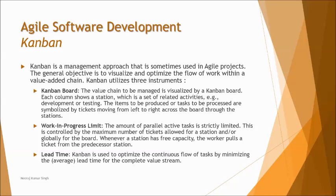Work in progress limit enforces strictness on parallel ongoing activities, setting a cap on how many tasks can be executed simultaneously — for example, limiting to five tasks at a time regardless of team size. Lead time is about optimizing the continuous flow of tasks by minimizing the average time taken across the complete value stream — determining how much time is taken to complete a task from start to end.